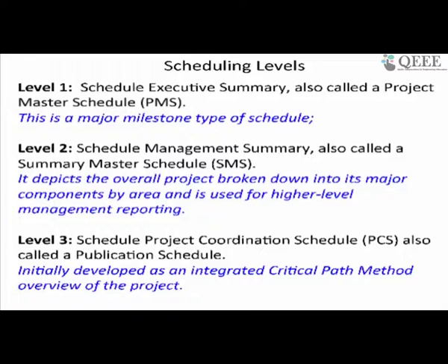Now, one more point which I wanted to cover before we start with the topic is, when we look at a schedule, there are several levels. Okay, so we talked a little bit about the project master schedule last time. I just wanted to give you a formal structure as to the different levels of scheduling, and then you can see level 2 schedules, level 3 schedules, and you can see level 3 is initially developed by critical path. So level 1, level 2 need not use a CPM.